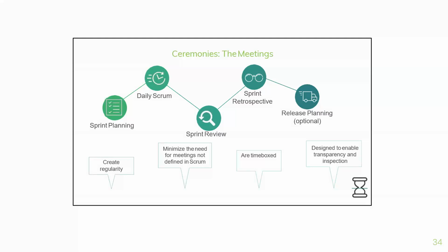Yes, so the meetings, we have sprint planning. These are the ceremonies that happen within Scrum. Your sprint planning is where you plan the things that you think you can handle within a 2-week period, right? And then your daily Scrum, or daily stand-up, is basically an update meeting. Hopefully from next week, in the next 2 classes, we'll take live examples and you'll see what it is. We'll do some role playing as well so that we can see how it works.